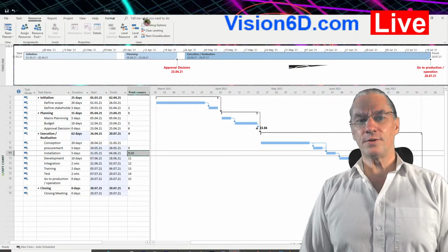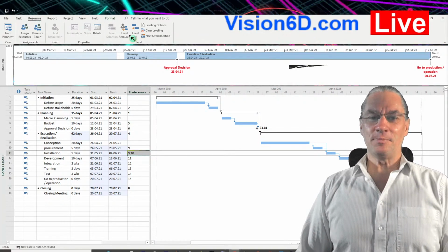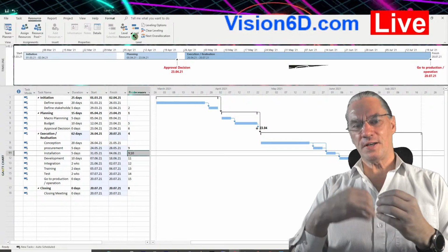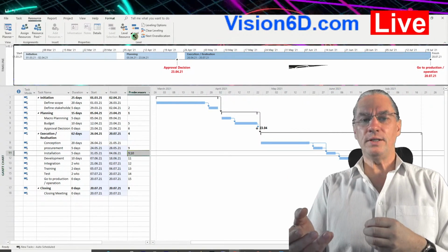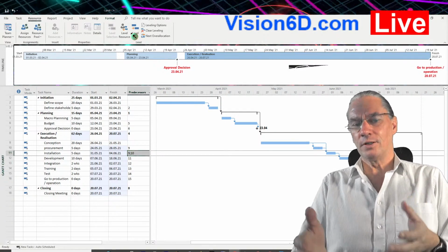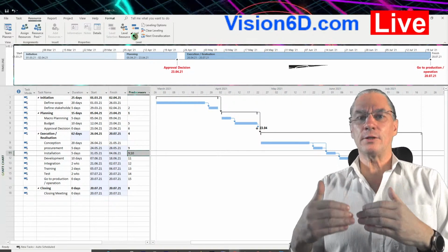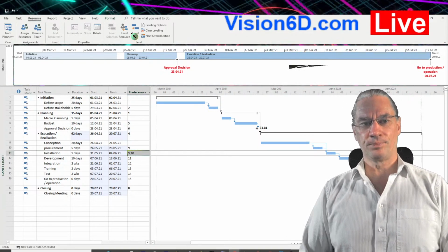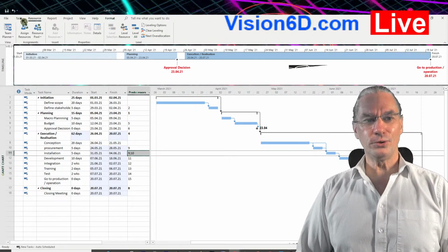So this is what you find for the moment. And here is a part that we won't look at today. It's about leveling resources, because when you are assigning resources to tasks, it might already be that the resource is already working during that time on something else. So there are conflicts. And it's this that we call over allocation of resources. So good, so far so good.